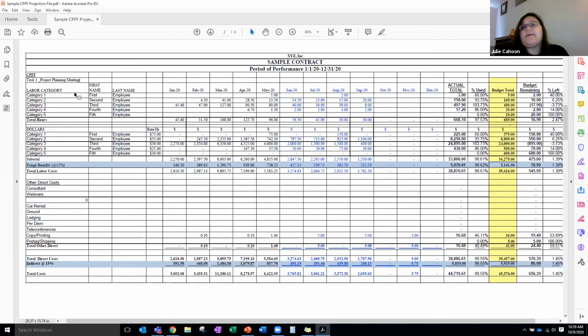So for this particular task, you'll see that we started planning in January, and the event is going to take place in October. So you'll have up through September to do all of the planning that you need for the project. And so for this particular snapshot, we've worked up until May. And so this is how much work has gone into the project so far, January through May. That's showing us what has already been used. June through September shows us what work we project we have remaining.